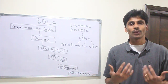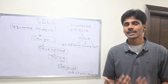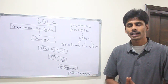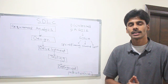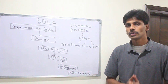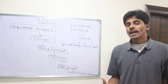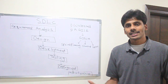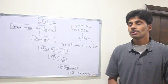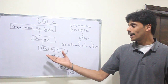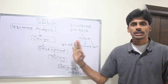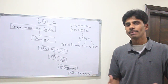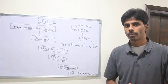It's her job to make sure that we as developers understand, and also the QA team and the testing team understand the requirements, so that the testing team can parallelly write their test cases. The testing team is not going to wait until we finish the development — they are going to start writing their test cases and be ready by the time we develop the product.